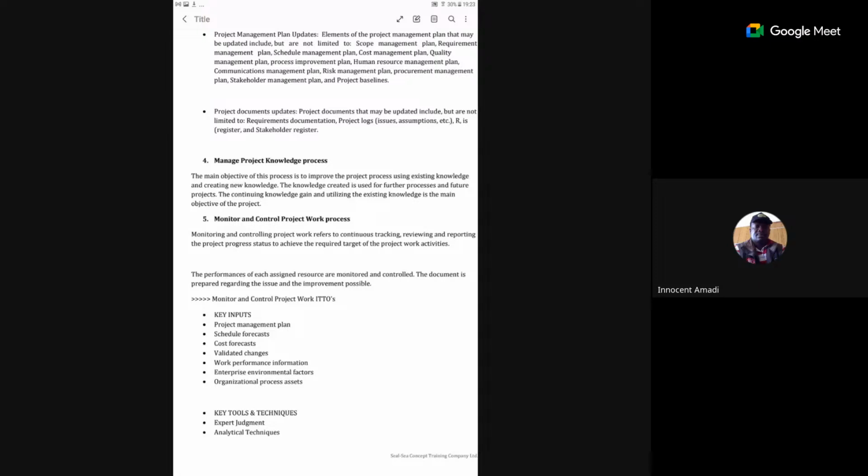So in your project integration management, before you start your project, you must have plans on how you will always improve on every phase that you have achieved. This might be that you are setting up that, okay, fine, every five days, supervisors or each unit that you have will come and give reports on what they have done and the challenges that they have faced.